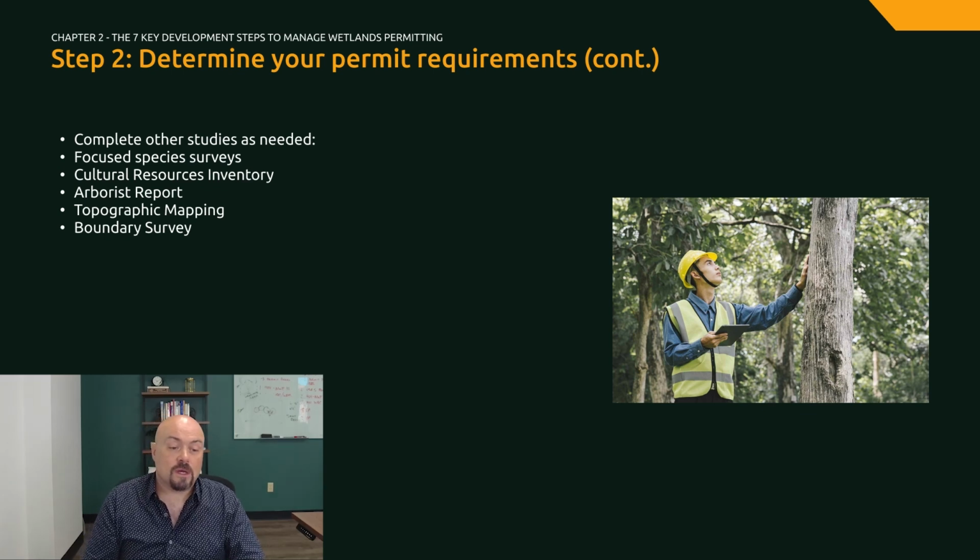Other trees such as oaks in California are considered native and often are protected under city or county ordinance as well as CEQA. Trees typically need to be a certain size to be protected, usually 6 inches or larger in diameter at breast height.